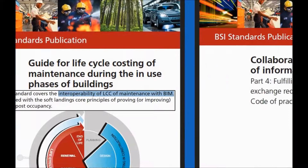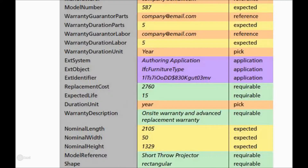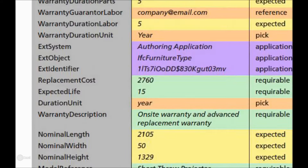Moving on to the COBE standard, if you've paid attention to the data that is required to go into every 3D model for every type of object, this is what you should find. In the middle there, you can see replacement cost and expected life lines of data. These should be very valuable pieces of information for anyone looking to perform a lifecycle costing analysis, although how this is calculated and by whom should be another consideration.